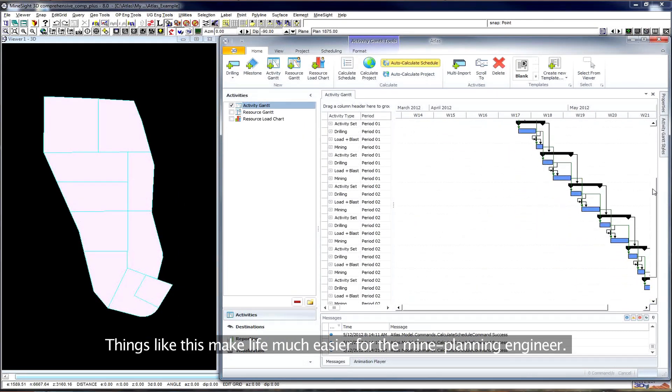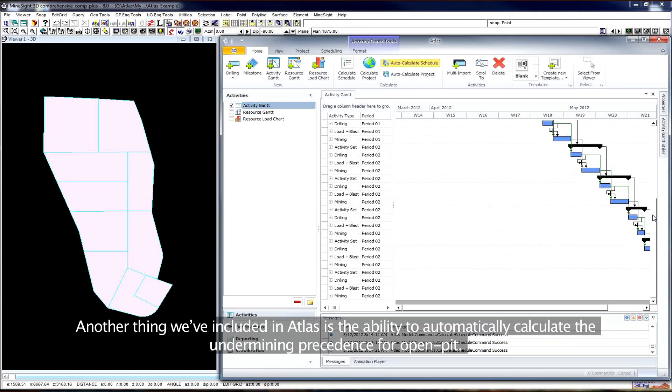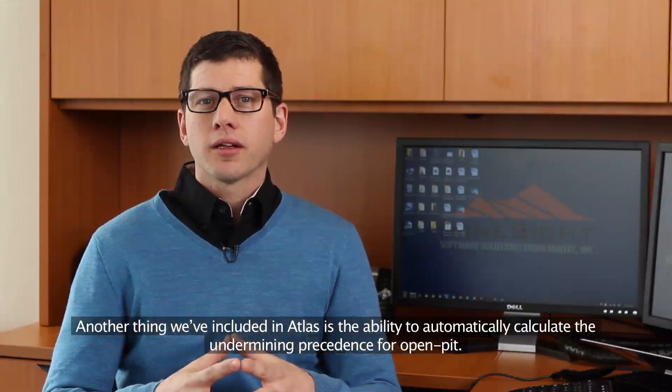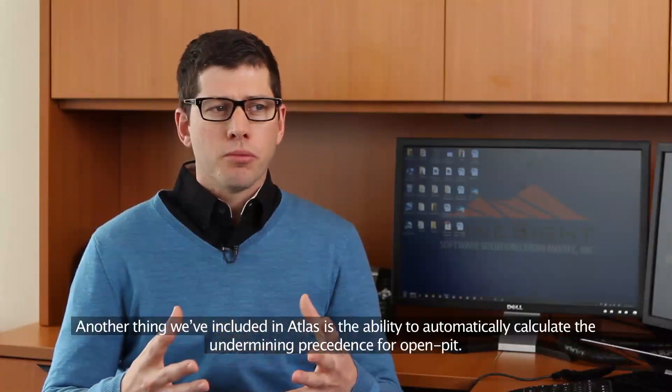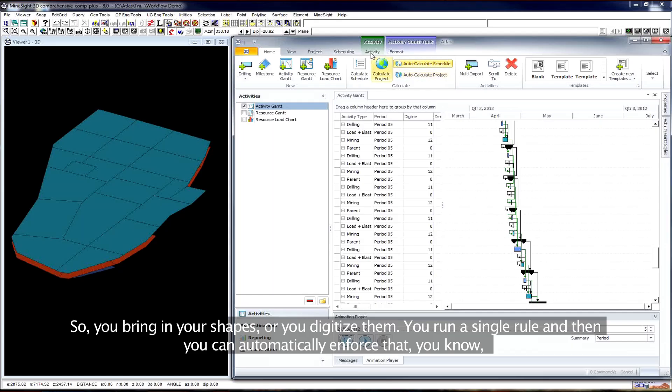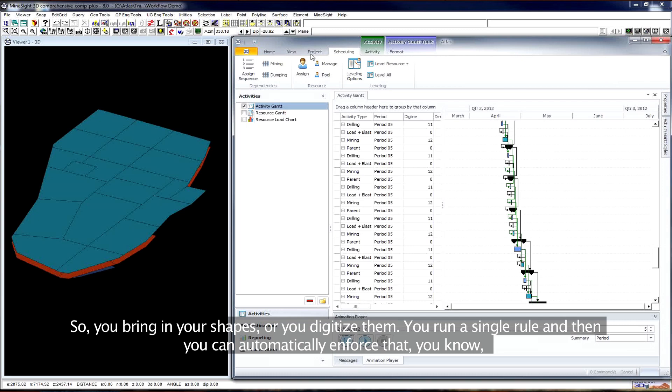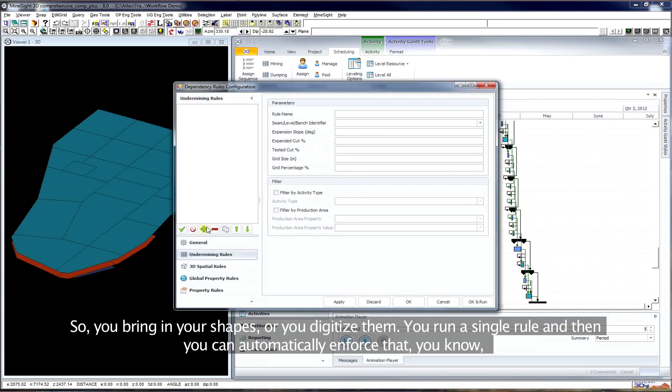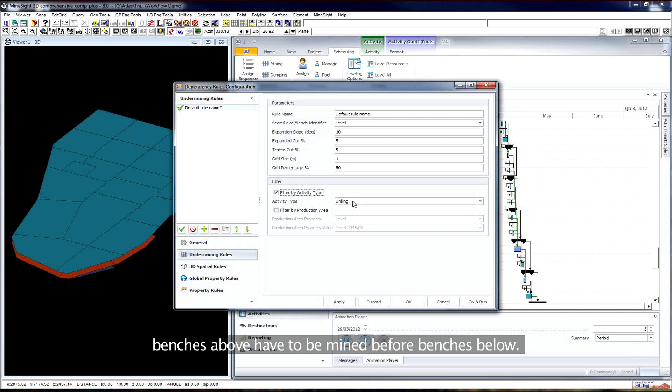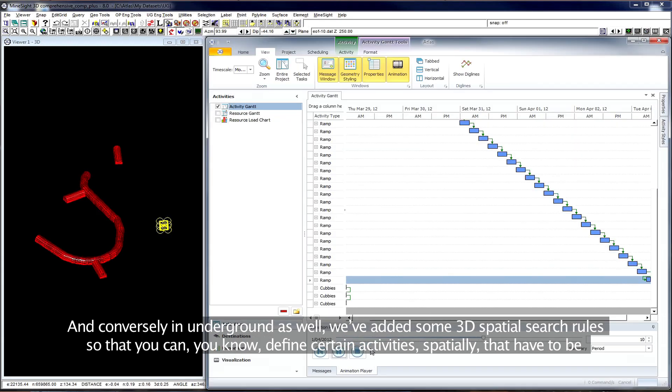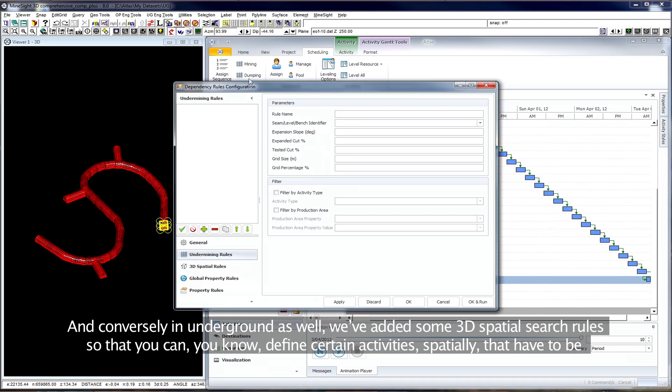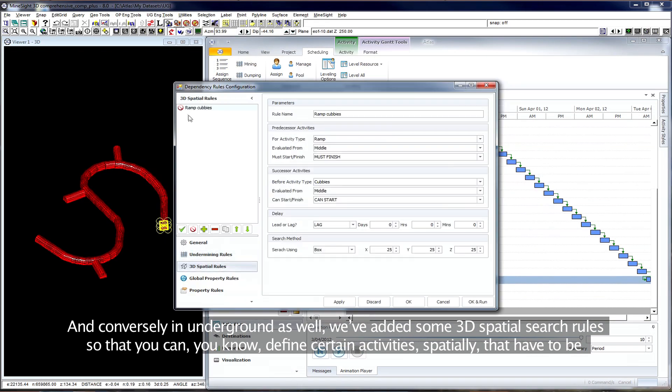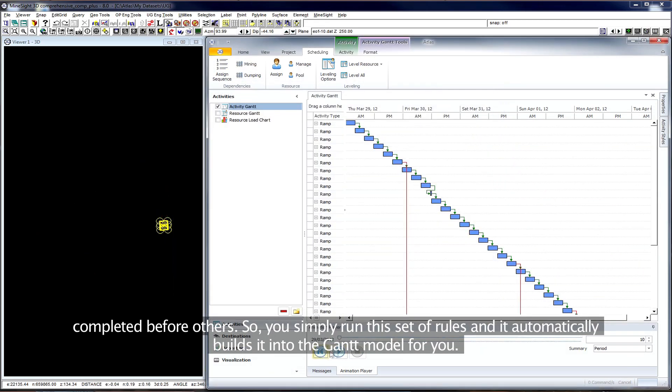Things like this make life much easier for the mine planning engineer. Another thing we've included in Atlas is the ability to automatically calculate the undermining precedents for open pit. So you bring in your shapes or you digitize them, you run a single rule, and you can then automatically enforce that benches above have to be mined before benches below. And conversely in underground as well, we've added some 3D spatial search rules so that you can define certain activities spatially that have to be completed before others. You simply run this set of rules and it automatically builds it into the Gantt model for you.